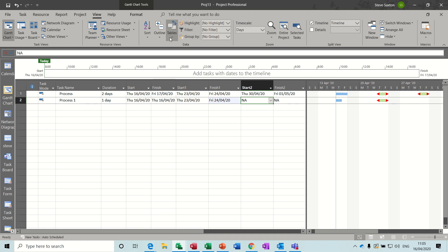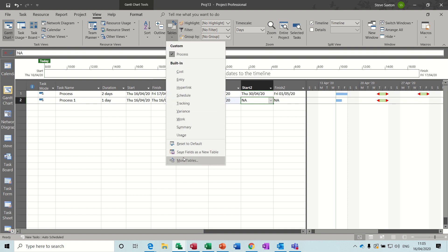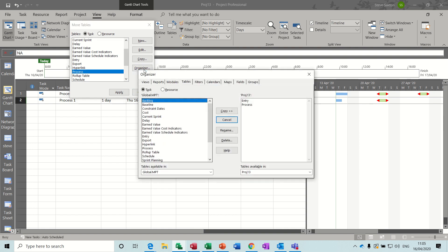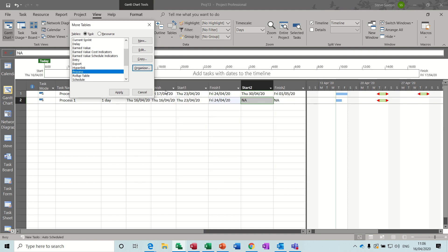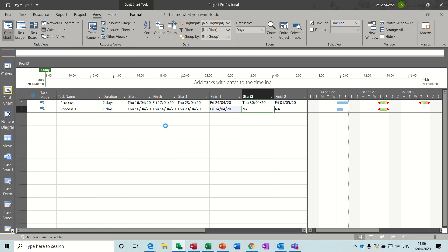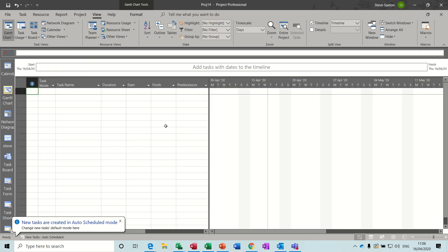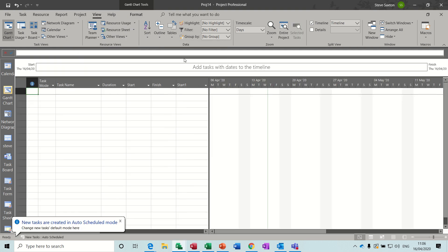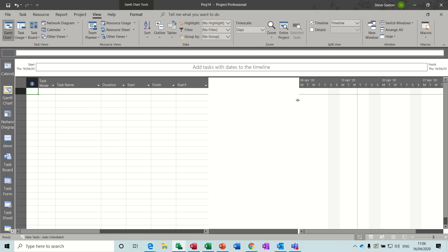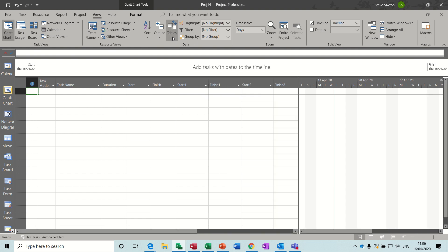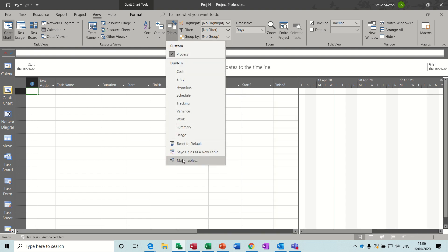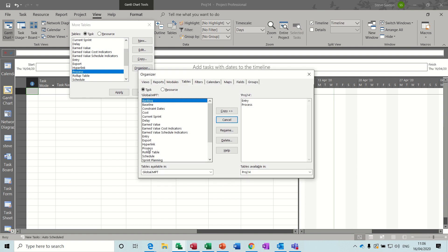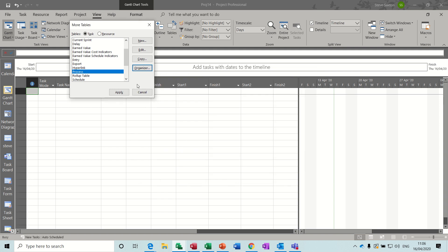Now when you save a table, so if I go back to more tables, if you look at the organizer, you can see your table is there but it's also in the global template. So in theory if I close this down, come out of this, cancel this, do Control N for new, go to tables, there's my process table, so it's still there. And if I show you in the more tables organizer, you can see process is in the global template. So if you didn't want that, you would have to make sure you're not on it otherwise it won't let you delete it, but you can just delete it and get rid of it through this organizer box.